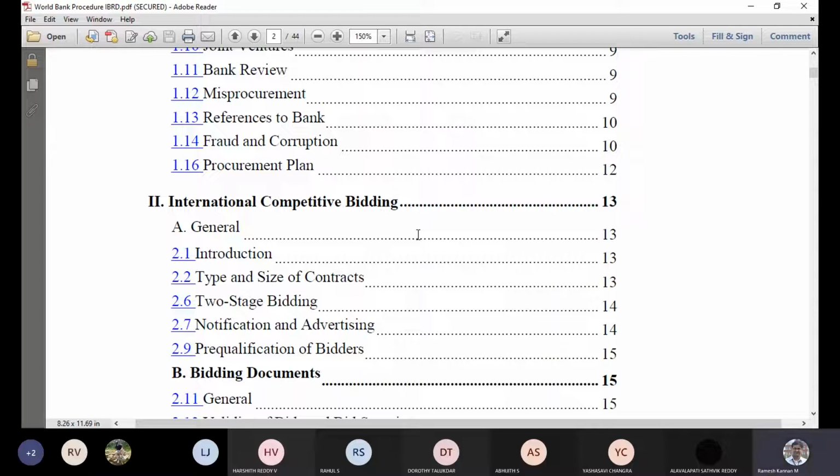One example is procuring raw materials from local regions compared to transferring from abroad or from other countries. In that case, the initial procurement can be given to the native or local bidders, so that from the next step onwards, for the construction, they can get some specialized agencies. In that case, two-phase bidding will be a really